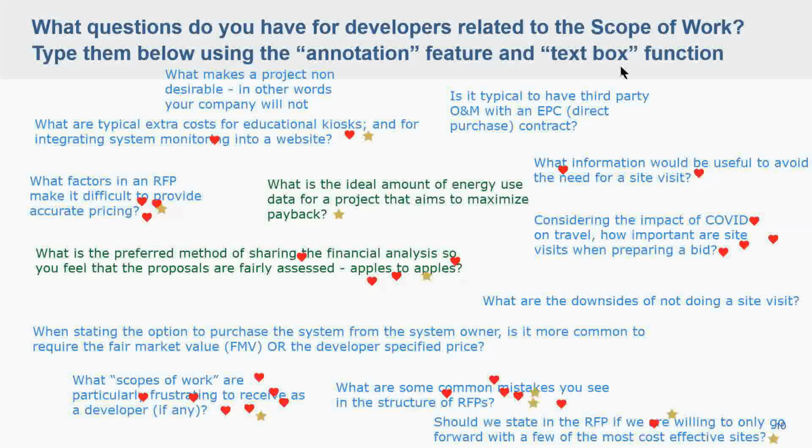There are lists like solar contractors. They'll put out a website of the top 100 solar contractors. The important piece is differentiating between whether you are looking for an actual developer who is going to bring finance and offer you a PPA, and who would then probably bid out to a solar contractor, or whether you want to work directly with a solar EPC, which normally would be if you're planning to own the project. There are certainly lists you can Google, and Ryan, I can send you some links as follow-up.